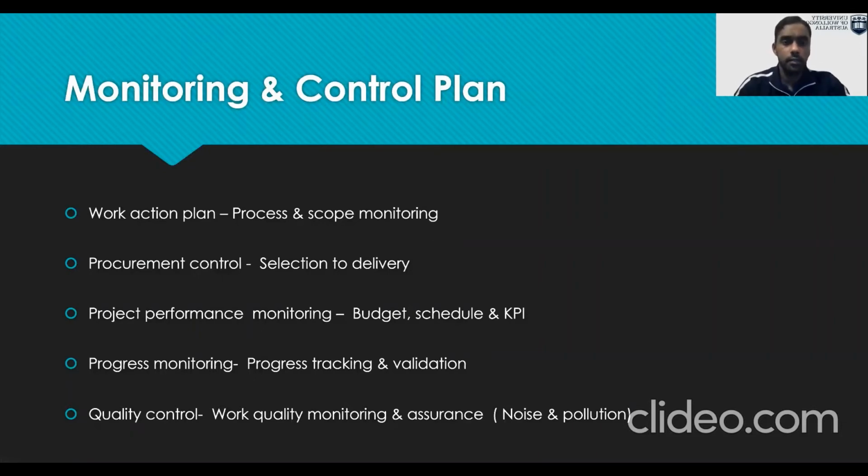Next is monitoring and controlling. These are the main methods we use for monitoring and controlling. First is project controlling. In this, we included timekeeping, safety induction, allocating the number of manpower and resources, and site cleaning. And next, we have scope monitoring. In this, we were vigilant about scope creep and wrote timely letters and emails.